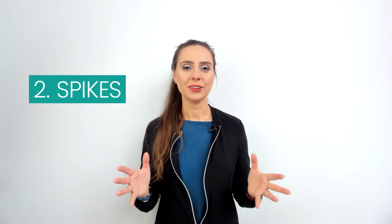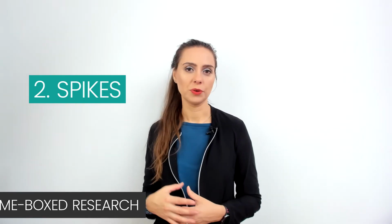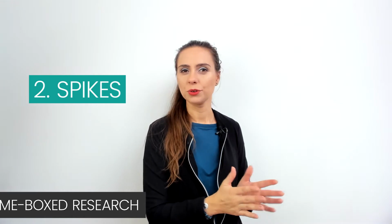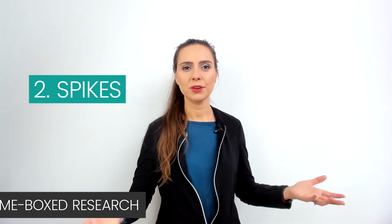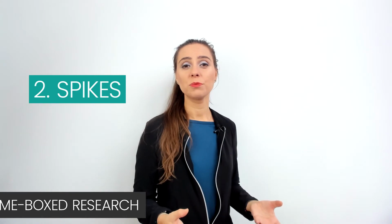Alternative number 2, spikes. Spikes are time boxes used to research a particular topic. Usually we use spikes as 1, 2, 3 days of research, trying to gather as much information as possible. Eventually we do some prototypes, some proofs of concept, but imagine that you take this big effort into 1 hour, 2 hours. Instead of meeting today, we are going to have 3 spikes of 2 hours in groups of 3 people. And we take one topic and we try to prototype it.